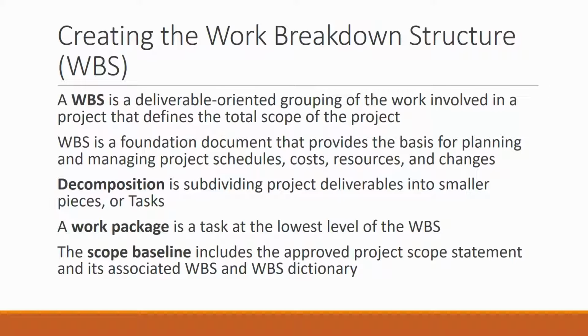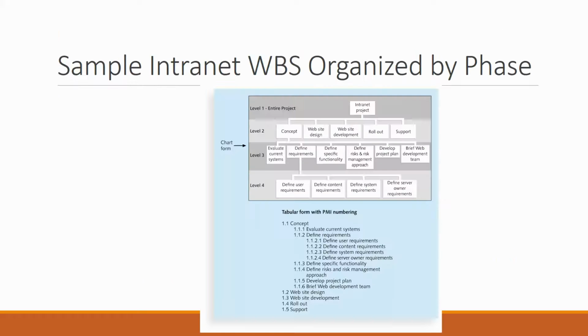It has been approved that this is the scope of work that's going to be done as a result of the project, and we baseline the project, being that we set it at a point in time, and then we work the project. And as we work the project, we then report on the project's progress using the project scope baseline.